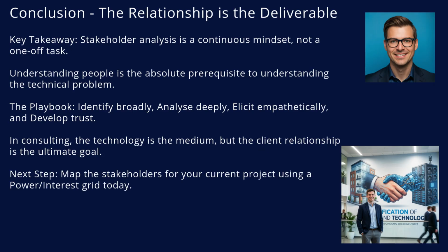Your next step is practical. Take 15 minutes today to map the stakeholders for your current project using a power, interest grid. You will be amazed at the clarity it brings.